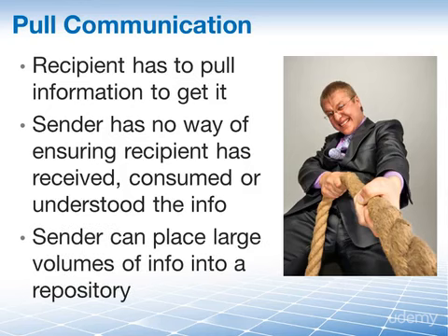The advantage for me as the sender is that I can place large volumes of information into the repository, and you as the recipient, you can choose what you want to receive. Maybe you never even downloaded this lesson, so you will never hear what I am saying. Common uses here are obviously RSS feeds, blogs, forums, intranet websites, and yes, the project management Prepcast. Bottom line is you get the information when you want it.